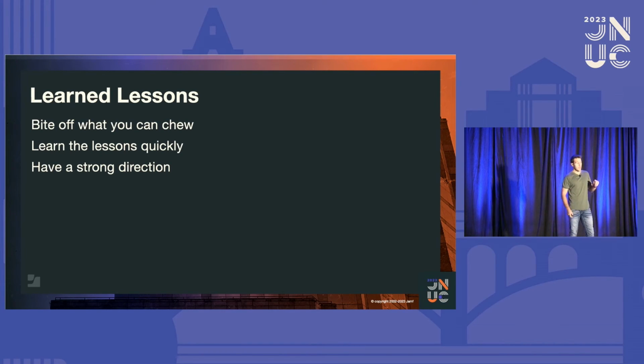So we had a 27% error rate with this Jamf Connect rollout, the one I'm talking to you about now. Our new one had a 2% error rate. We started out at basically 8.0 for Jamf Connect 2. We had our Jamf Helper script ready. Our comms was on point. Our documentation was ready. And we started out with 2 contractors. We were fully prepared for that 20% error rate. Not happening this time.